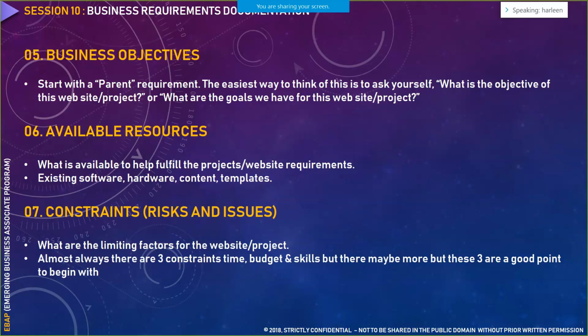Yes, absolutely. So risk is an unforeseen situation that might happen in a particular project. For example, your project needs a specialized skill set of resource like Salesforce, which is in huge demand. Now you don't know whom you have hired in that particular project, and the person who has taken the responsibility of developing that application may leave your organization anytime.